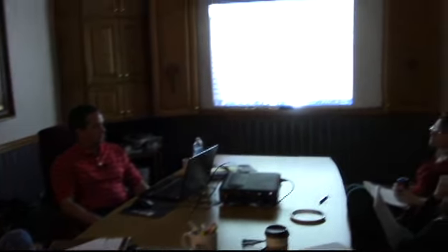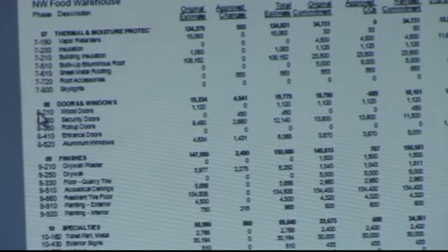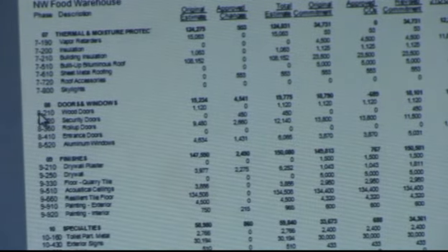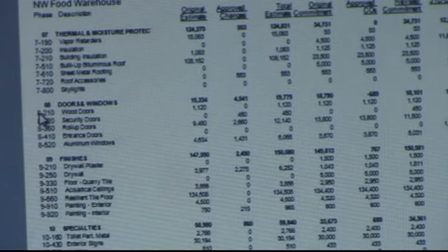So if you have a prefix and then a follow-on code, it is possible, if you're charging to 15123 and 15124 and 15125, to put all your estimate in 15100 and then your costs are hitting in 15123, 15124, 15125. Then you can look at the division 15 level to say, here's what my estimate was, here's total estimate, total cost. So as a project manager, we can just put the lump sum in under the category, and then as they enter the data, it'll break it down to who worked what hour or how much.